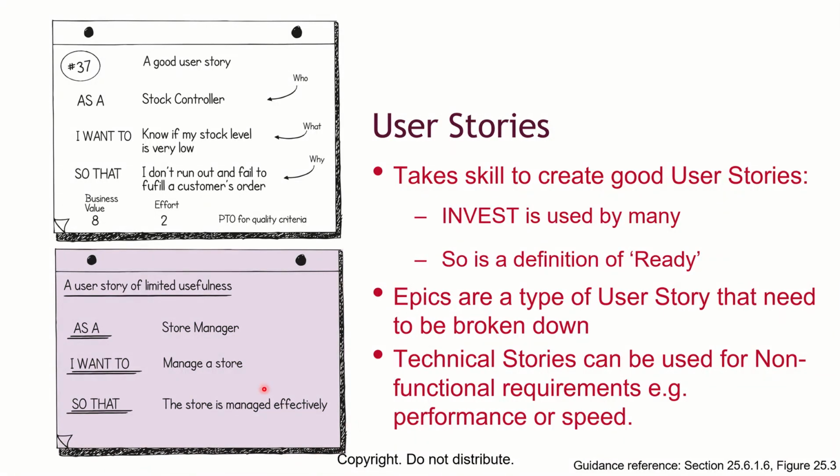Like in the case of this now, this can just be what a user will tell you. This is just what we want to do. You have to break it down into user stories. So, epic, a user can tell you a user story, but by the time you look at it yourself, you know that this one cannot be achieved within, for example, 2 to 4 weeks. So, you have to break it down into multiple stories.